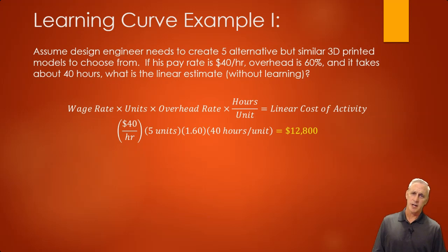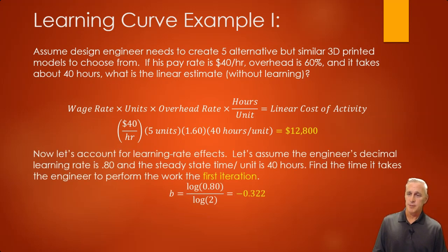So that cost would actually be fairly high, or probably extremely conservative, which you can do. You can have an extremely conservative estimate. It just depends upon how competitive the playing field is. If you're in a highly competitive industry like construction, you probably can't do that. But in other areas, you might be able to get away with it.